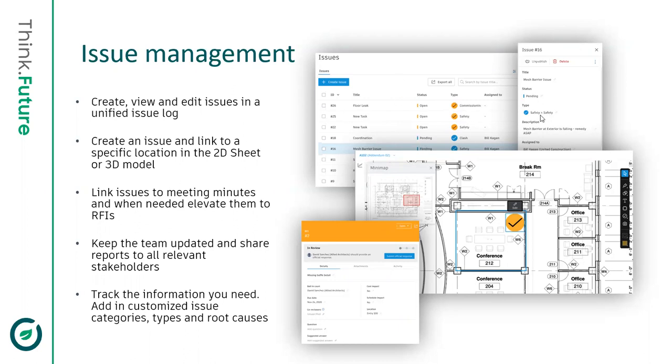You can just describe your issue. So what you can do is pin up your issues on your drawings or even on your models and even your PDFs. You can pin up the issue at the very location where you want to, describe the information about that issue, and even assign it to a particular member. Then you can also attach references in the form of RFIs, minutes of meetings, or daily reports to a particular issue.